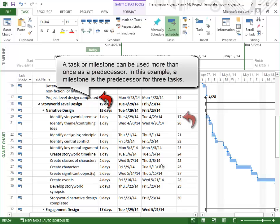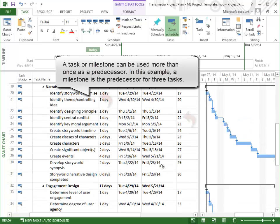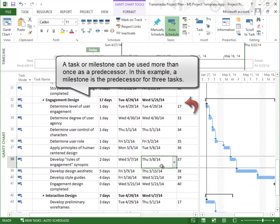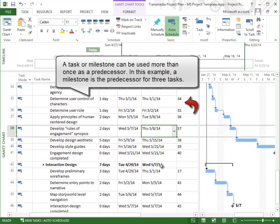A task or milestone can be used more than once as a predecessor. In this example, a milestone is the predecessor for three tasks.